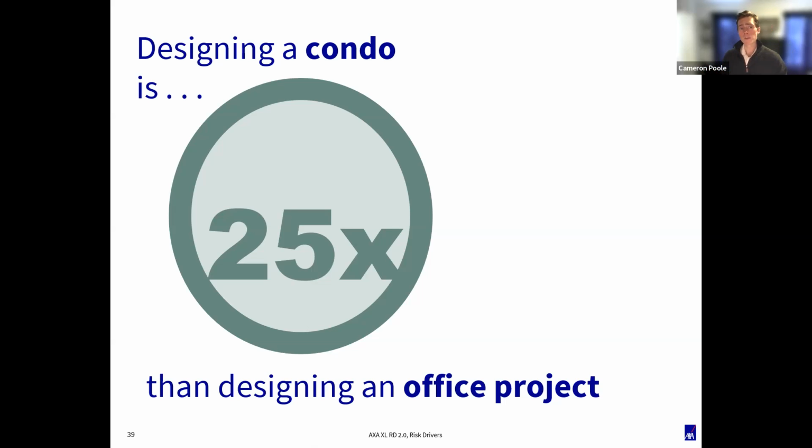The other thing to have in there is a delays clause. So a clause that pretty much says the architect will not be responsible for any delays caused by things outside of their reasonable control, right? Things that you can't control, delays in materials coming, contract delays, those are all outside of your control. And so you want to have in your contract that you won't be responsible for that. Those are probably the two best contractual protections there. And then, of course, you want to have the consequential damages too, because if there is a delay claim, that would balloon it.